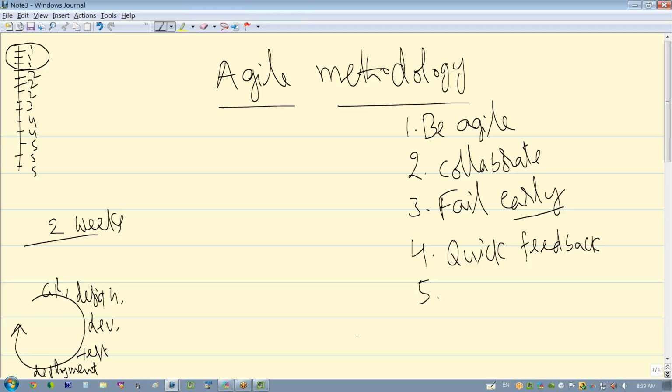I'm not picking those 1 or 2 items randomly. I'm getting them from the prioritized list. So at any point, I'm only working on the top priority items. That's the most beautiful thing here. Within these 2 weeks, I'll gather the requirements only for those 1 or 2 tasks, design, develop, test, deploy, and then push it to production. So users are getting a taste of how the product is going to look. Then I'll do one more 2 weeks.